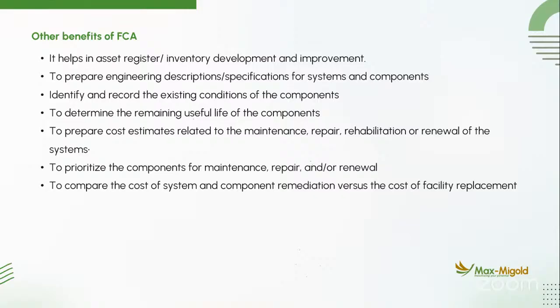Then it also helps you to identify and record the existing condition of the components, to determine the remaining useful life of every component within that facility, to prepare cost estimates related to maintenance, repair, rehabilitation, and renewal of the system, and also to prioritize the components for maintenance, repair, and renewal. When you conduct your assessment, you list your deficiencies in hierarchy or priority. What can you attend to immediately? What can you attend to in a month's time? And what can you attend to in a year's time? You prioritize them. Then you know what to attend to immediately and what you can leave for a while.